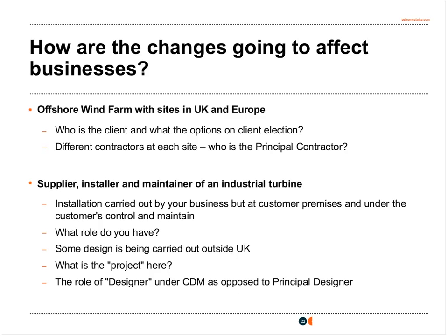And you are going to have duties as designer that when you are preparing designs that you take into account all health and safety issues to try and eliminate, or if you can't eliminate, at least reduce so far as reasonably practicable risk, including risks associated with ongoing installation work and maintenance work.